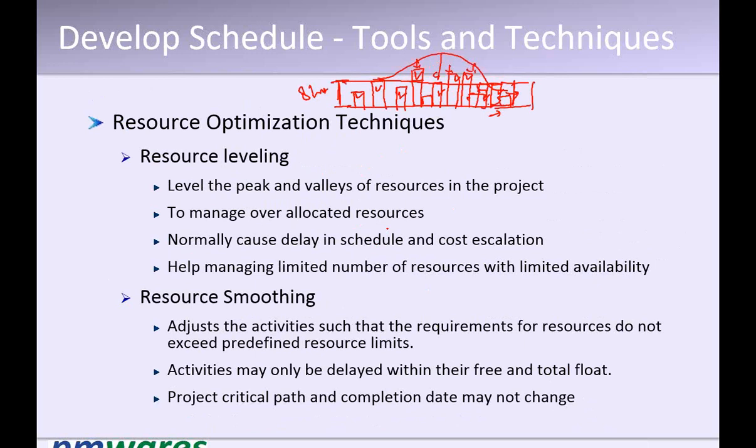So what is the industry standard for keeping this float or buffer, generally 5 to 10% or something else? No, it is not like that. You don't keep the float. It is available due to the situation in the project. Nothing is an industry standard. We normally say don't kill the natural float in the project. The float arises naturally because of the dependencies and the durations of the activities. Now resource smoothing can tighten the gap.